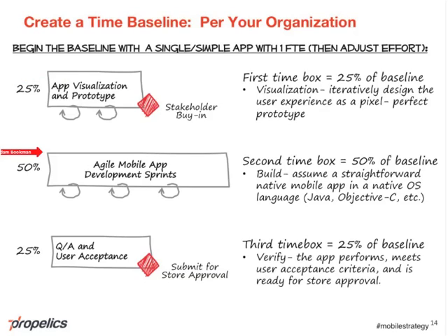The middle of the project, the middle 50%, if you will, the middle half, is the actual development itself. So this would be, if you're in Android, it's the Java. If you're in iOS, it's the Xcode. It's whatever the language is, and you're running that in parallel with any integration and development exercises. For this exercise, we'll say it's not integrated. We're thinking 1 FTE, and the last step, the last quarter of the project, is your UAT and acceptance.